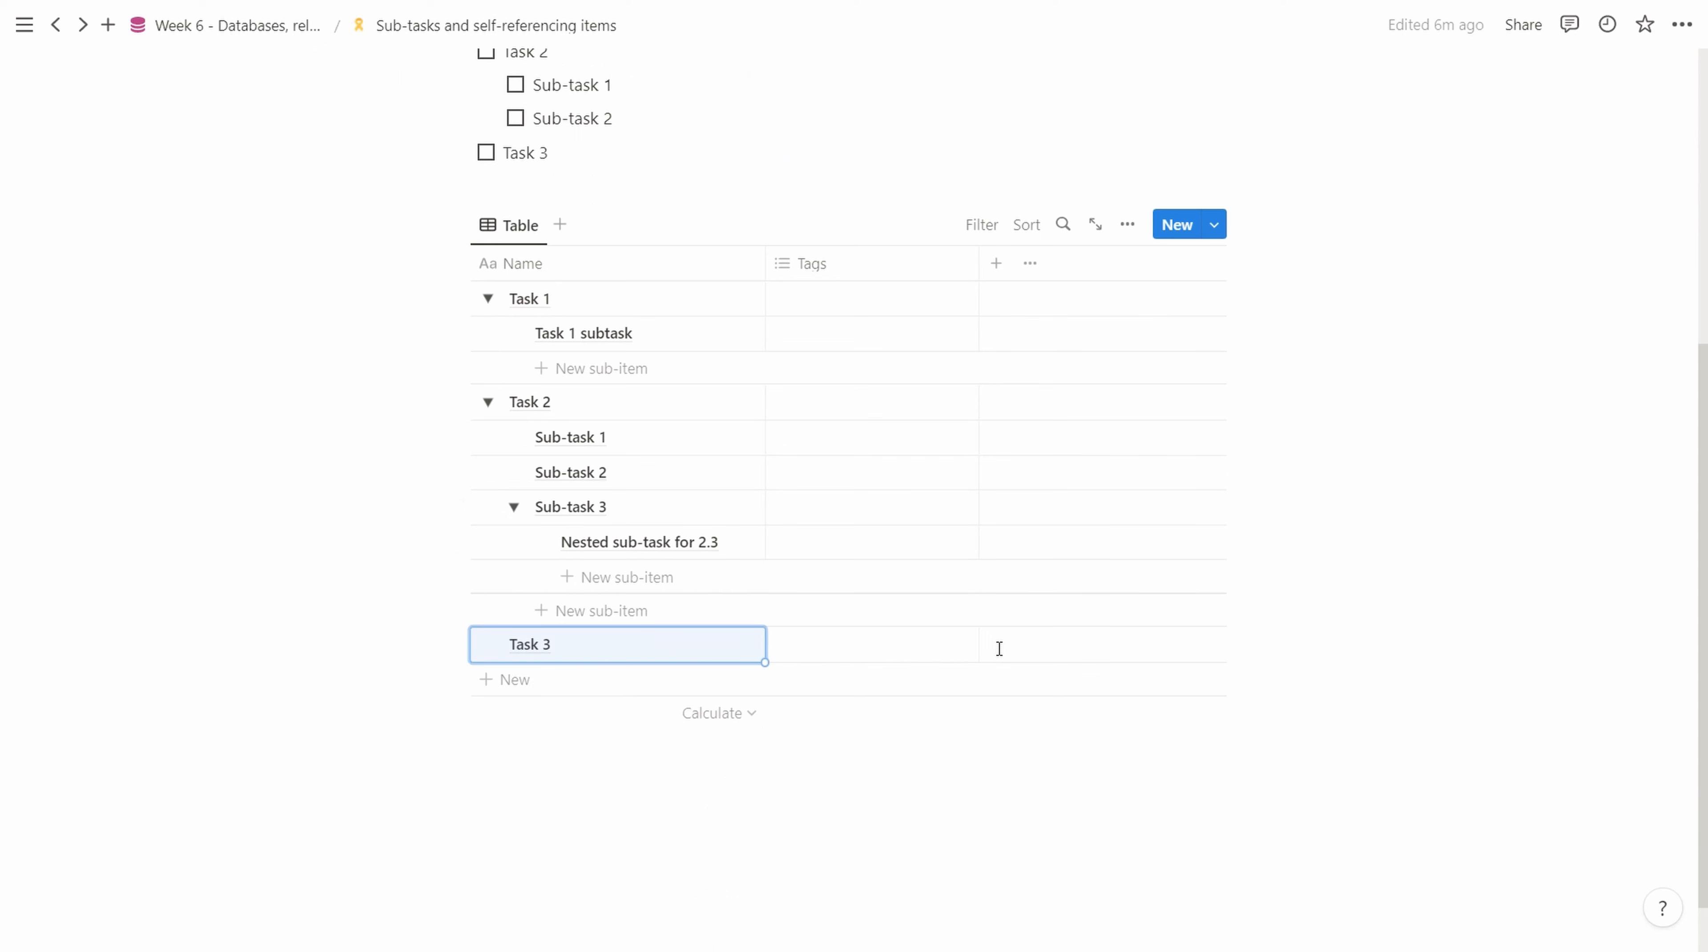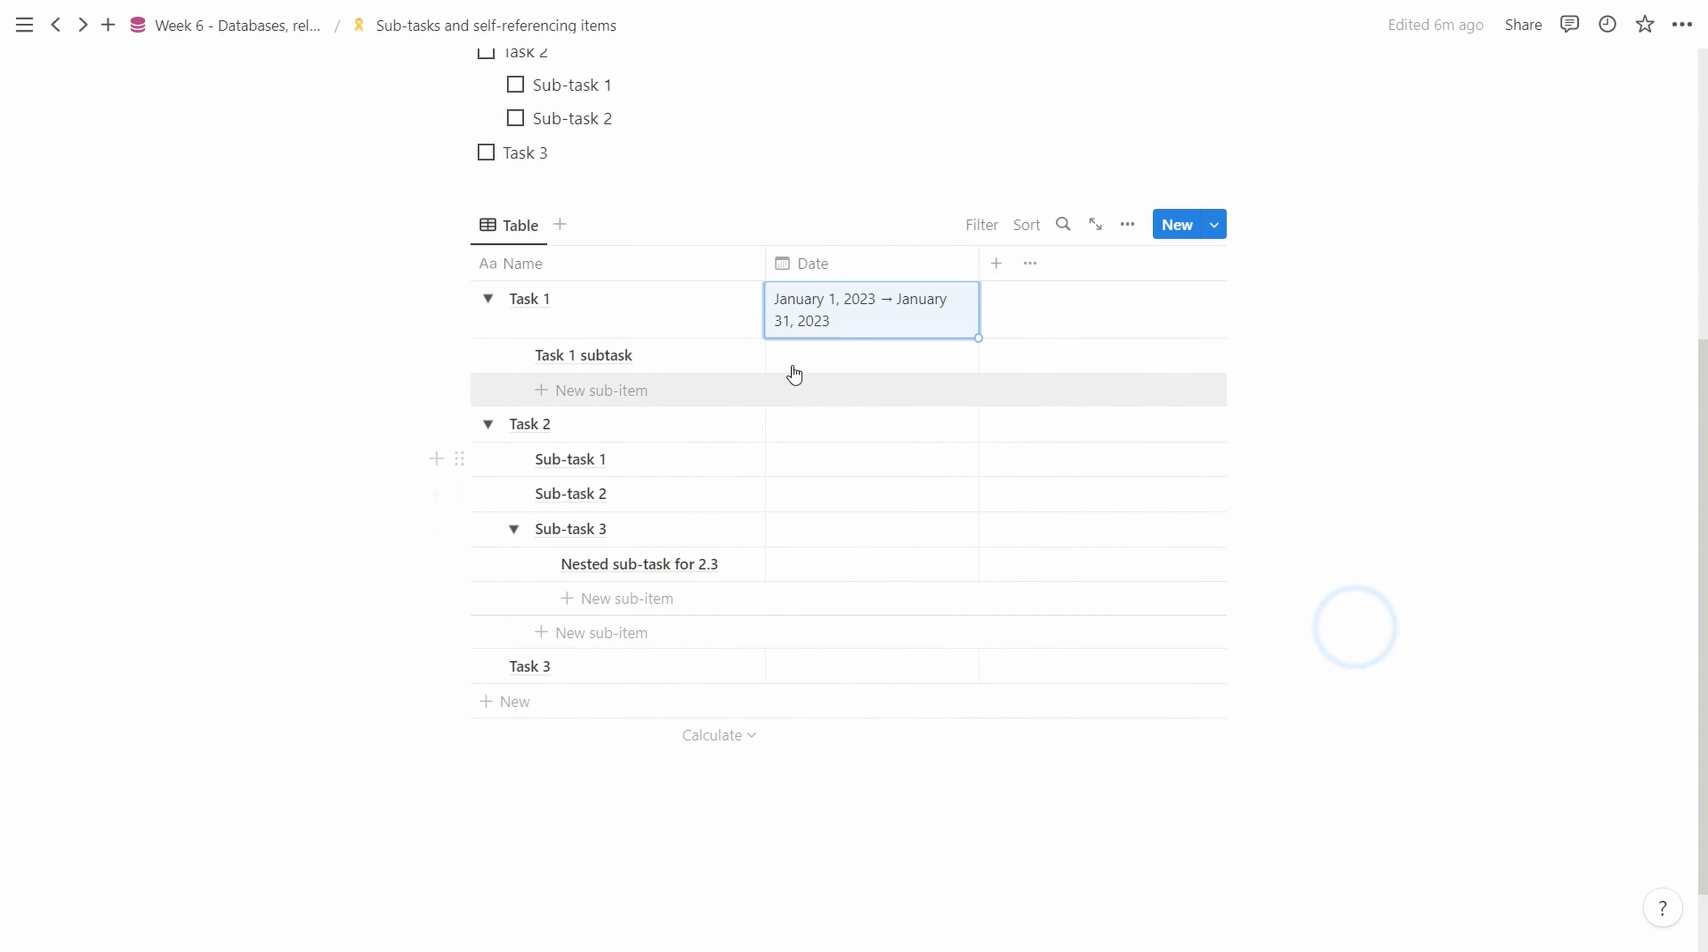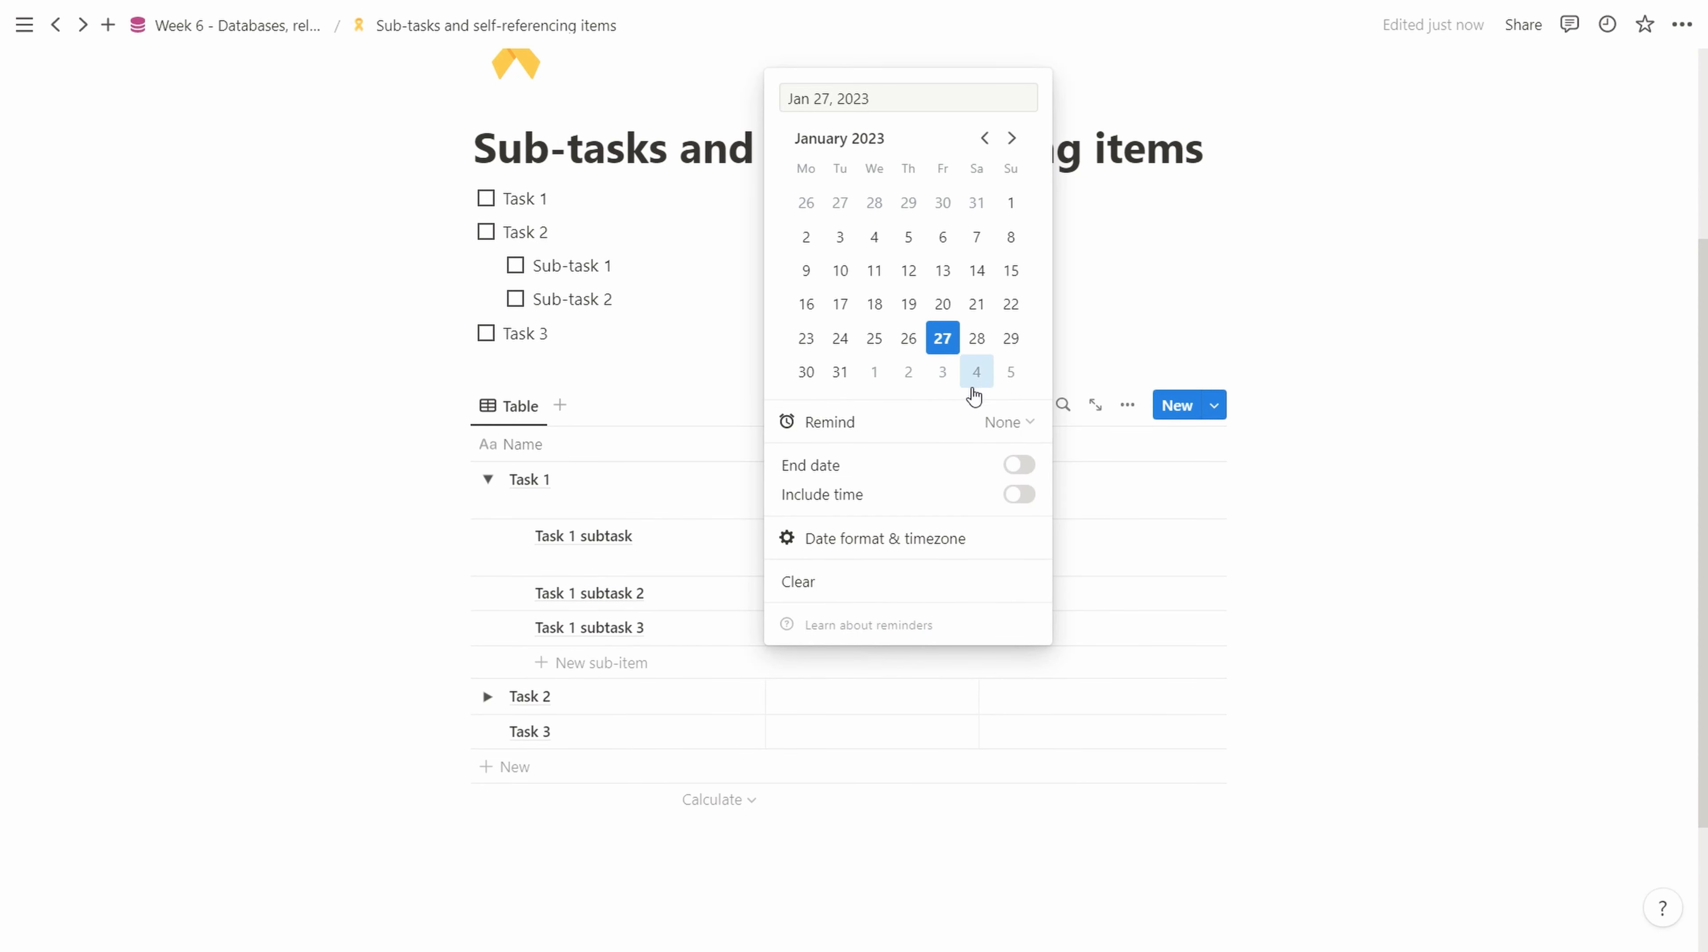The bonus tip I alluded to in the beginning, we're going to look at now. We remove tags and add a date property. We have the date here. We can say the first task spans the entirety of January. Then our subtask, we're going to do that the second week. Then task 1 subtask 2, which we're going to finish the last of January. We create a third subtask and set this for February.